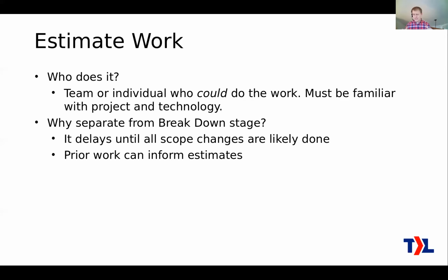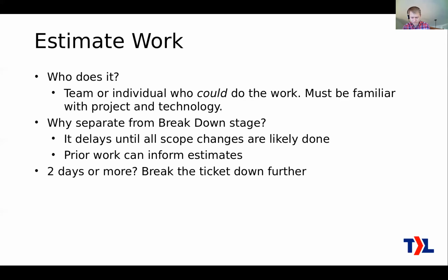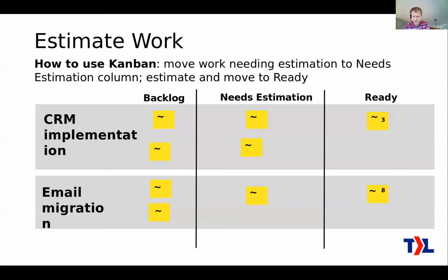So if you've delayed your estimation, then the things that your engineers learn can inform your estimates. If you don't wait and do it all at the beginning, then you're going to have to go back and redo that and waste some work. So that's a reason to wait. Again, if you find out that you've made tickets that are 2 days or more, that's too big. Break it down further.